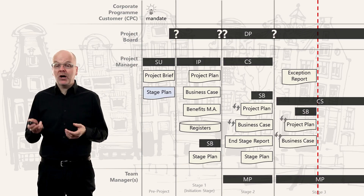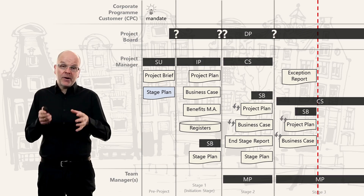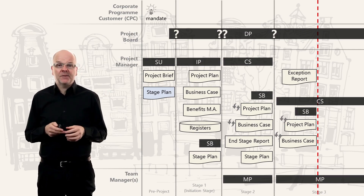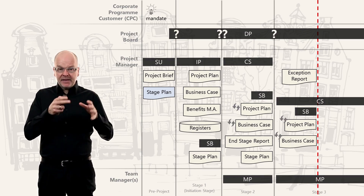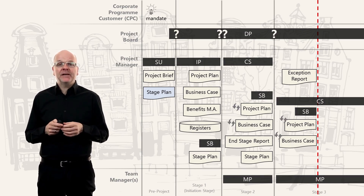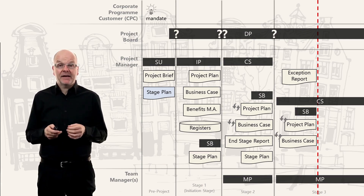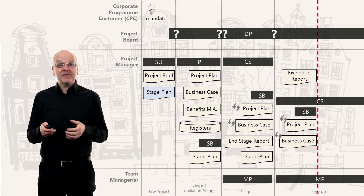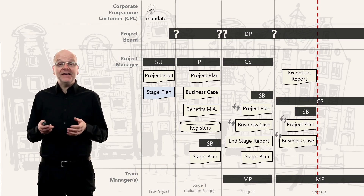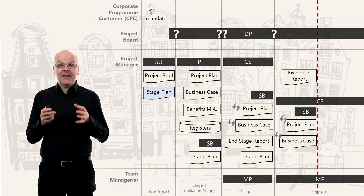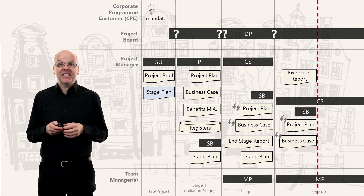In the project plan, the first thing updated is the status of the products completed so far in the current stage — perhaps 50 percent have been completed. We also update the end date of the current stage plan, as it will now be further forward than before. We update the business case too, since costs will increase due to the exception, and we may update the return on investment calculation. The project plan and business case are living documents giving an up-to-date picture at the end of each stage.